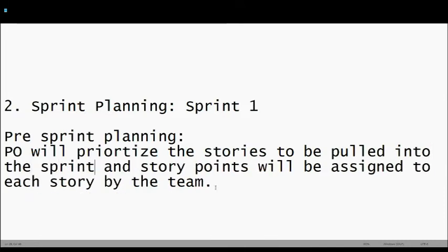Now, once that is done, those things will be pulled into the sprint by the Scrum Master during the sprint planning. They have story points, they are prioritized. If they don't have proper story points, they are not being prioritized, then it is a bigger problem because then you need to sit down with the PO and work with them to make sure they understand that before sprint planning, these things need to be done.